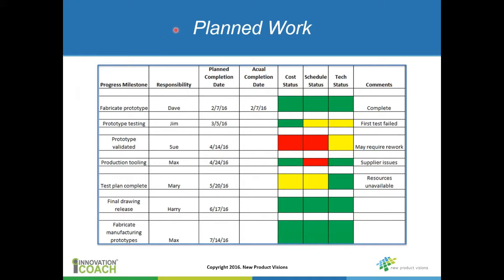As I mentioned a few slides ago, in my experience, you start with a high-level block diagram concept. You start to look at your phase gate and your high-level deliverables, and then looking at the specific project and coming up maybe with a high-level Gantt chart with these big blocks of time and identifying the critical path. And that really is starting to drive the overall tasks within the project, these big high-level deliverables.